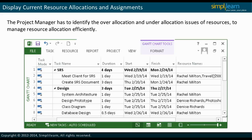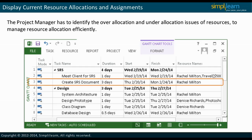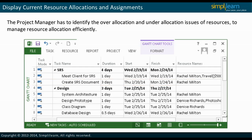The project manager has to identify the over-allocation and under-allocation issues of resources to manage resource allocation efficiently. When resources are assigned to tasks, the project manager can only see the resource allocation for a current task. At this point, he cannot see the overall allocation or workload for a resource. He will have to view the resource allocation for this information.